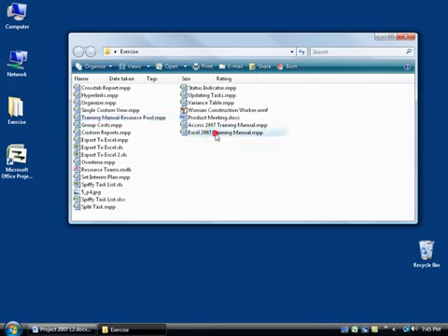If I have resources in this file and the same resources in that one, I'd have to open up both of them to find out, okay, am I using writer 1 in this one as well as that one on the same day? Too confusing. If I can go ahead and use it from the pool, it'll actually show me if that resource is over-allocated or being used on the same day in my own project plan here. I don't have to go to somebody else's project plan. Again, they're going to be linked up to the resource pool.